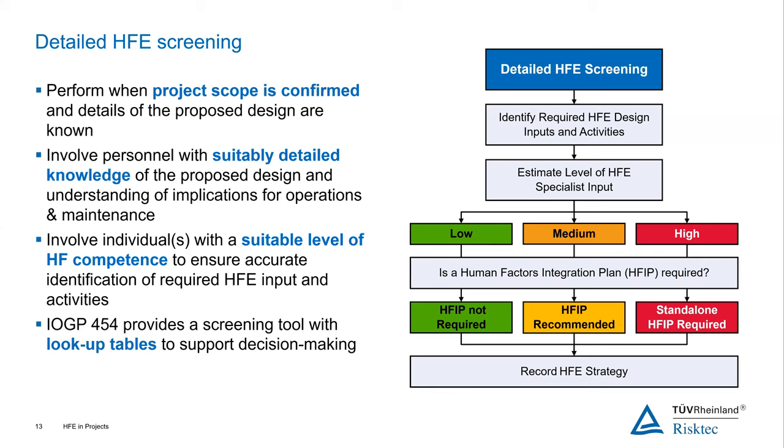So you want to think about what does that mean in terms of, are there going to be changes to operation and the way that we do things? And at this point as well, you also want to involve someone who's got a suitable level of HF human factors competence. And that's to make sure that, because this is the process where you're going to be identifying the activities you need to do, you probably need someone with a bit of expertise to help you firm up exactly what's required.